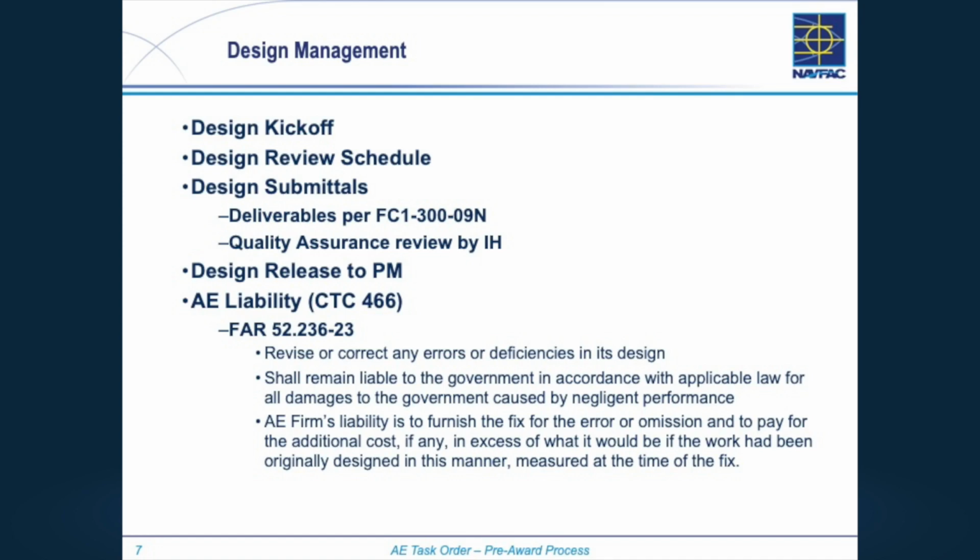But at that, one of the things you're going to establish is you're going to have your awarded task order that has the submittals. And let me just back up on that. A lot of times when we're putting together our statement of architect engineering services, our schedule says I get my first meeting minutes task order award plus 30 days. So now you know what the date of that task order is. So you really are establishing the schedule of the project. You may have told them, you're going to have 180 days from the date of the task order award.